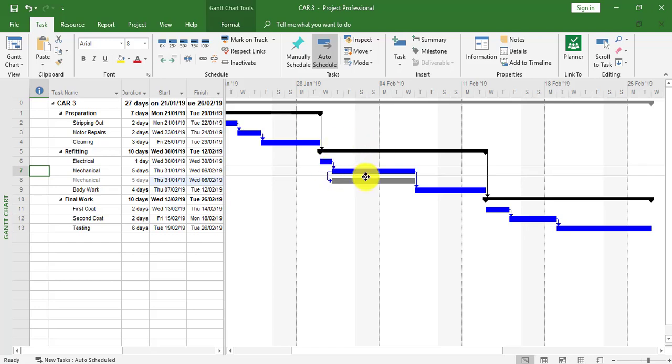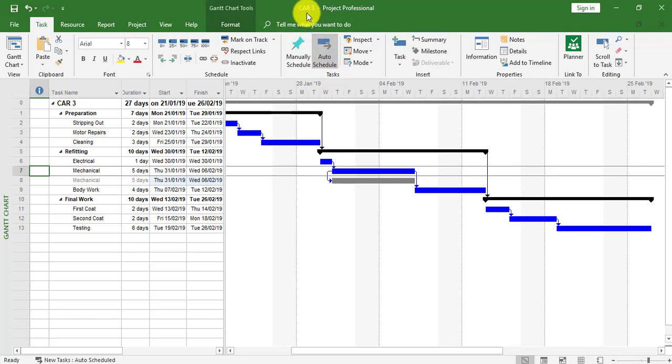Car 3 has also changed straight away. That's because the project was open. If the Car 3 project wasn't open and I'd closed it, I'd have had to use the Link Between box again to update the link. Because I left the Car 3 project open in this example, the link now has reflected.